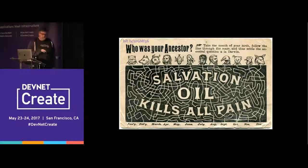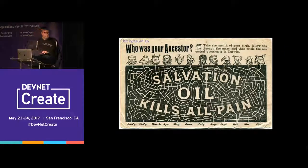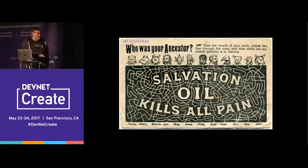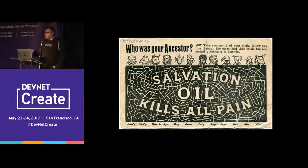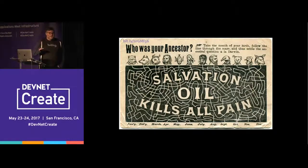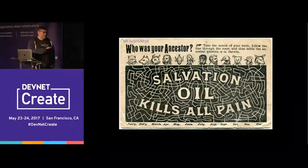A bit of a warning: if you don't know how something's going to work and the vendor or yourself are just saying 'we'll figure it out when we start moving,' take that as a warning sign. We had situations where we'd be talking to the sales guy from a vendor and he'd say 'yeah, we can definitely do that,' but we knew it was a high-risk area. We pushed and got into the room with the networking folks, and then it turned out they just couldn't do it. If we'd gotten to that point after signing the contract, that would have been a lot worse.